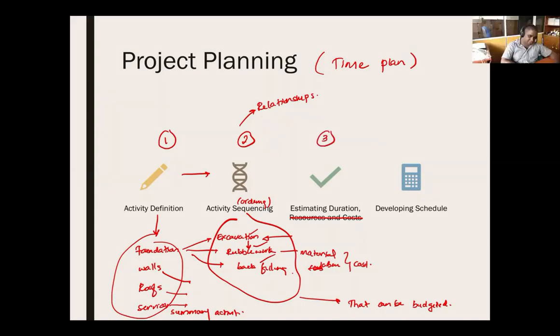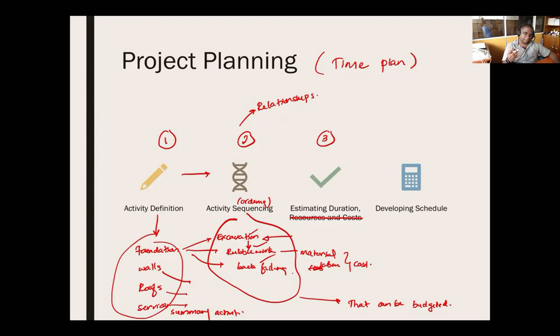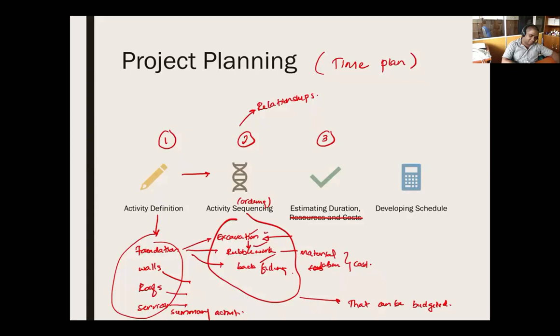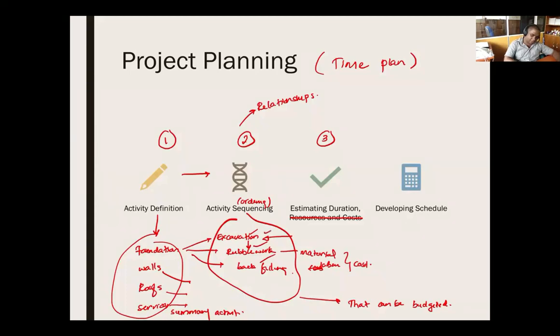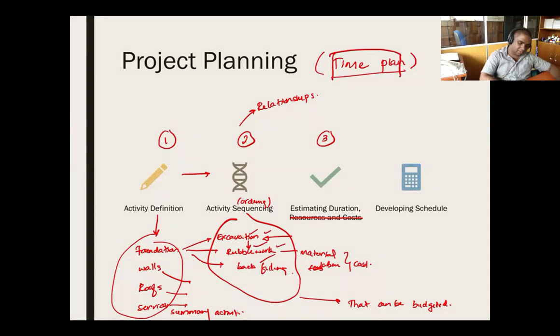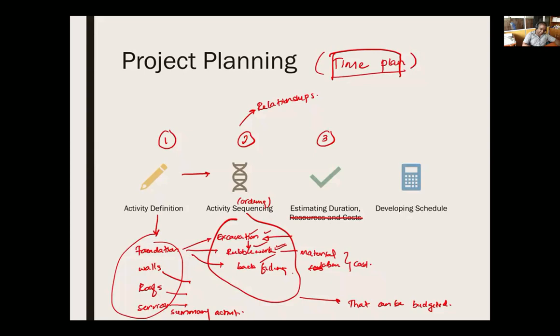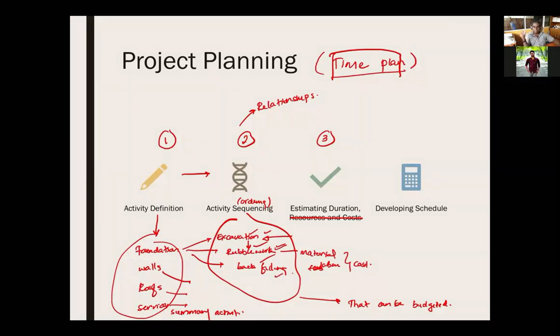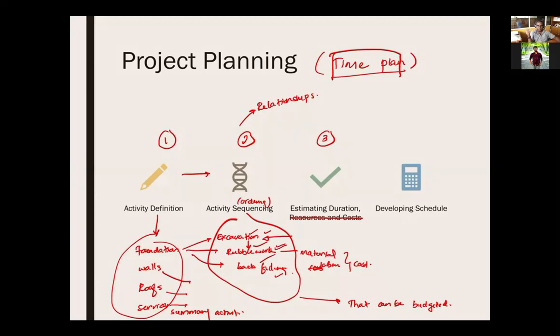Right? Then the third step is durations. The duration of each of these activities. So for excavation, with the amount of labor that we have, how long will it take us to do this excavation? This is the time plan that we're discussing. How long will it take for doing the rubble work? Backfilling. How long for each of these activities? That has to be known.